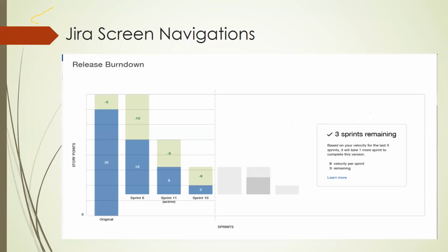How can we show these things? We have the data with us, which will show that for this particular sprint, we had 20 stories. However, we have only completed 10. 10 more are there to work, so kindly pace up the work. We will see how it happens, but let me see if I'm able to pull out this burn down chart in my application. All of you clear till here, this section? Yes, sir. Okay.